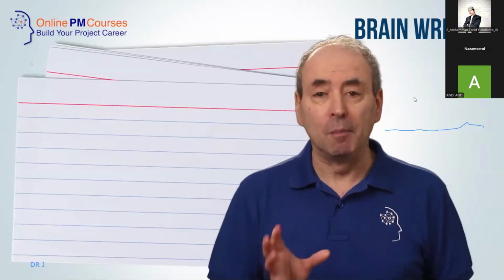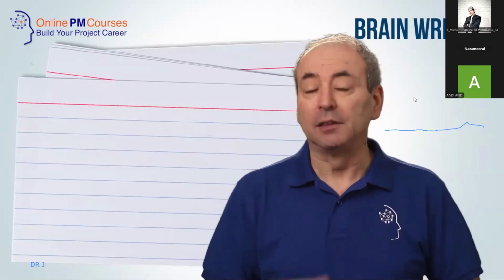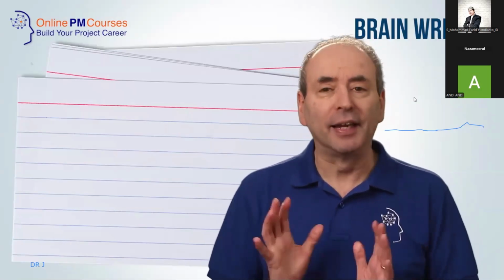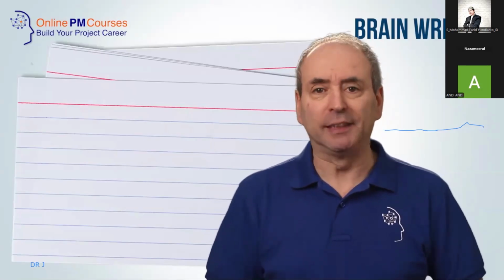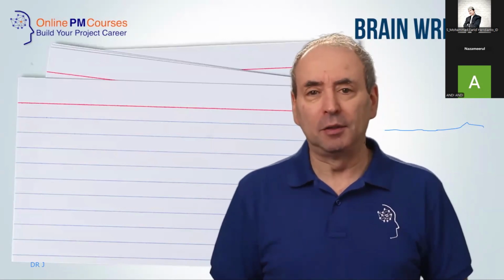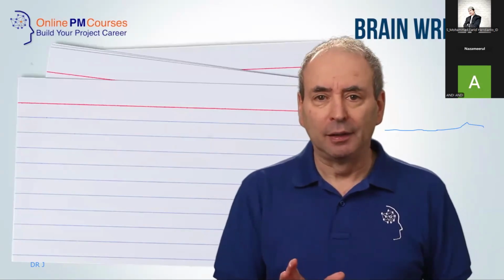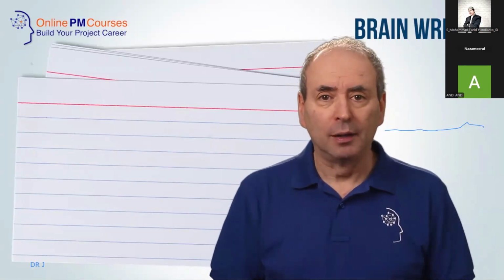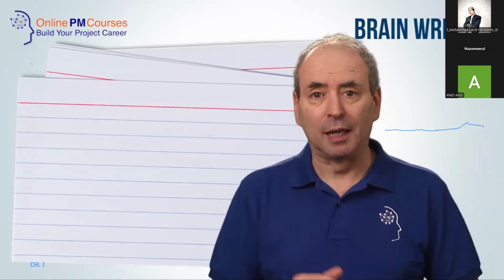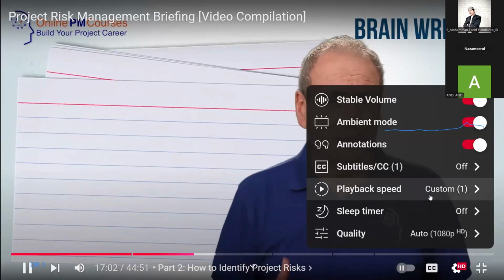If they can see a way to manage that risk or want to articulate a development of the idea of what that risk is, to specify it more or to explain it, they can add it to the card. With a number of rounds of this brain writing, you end up with a large number of cards, all with a lot of developed ideas. The only real downside is that in this process, we may well have some overlap of work because people will be working on cards with the same idea. However, there are ways to overcome that, and there are worse problems than having too many ideas and some overlap between them.